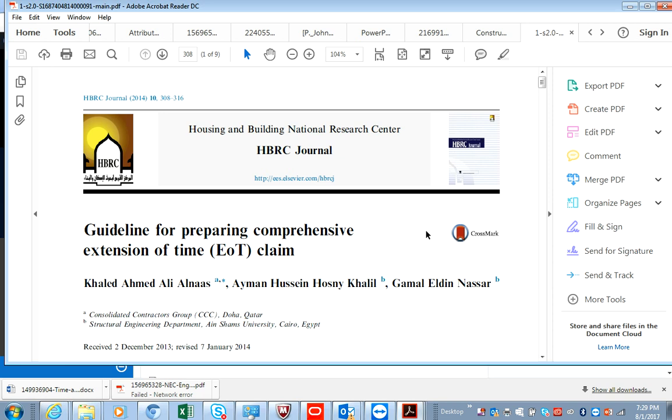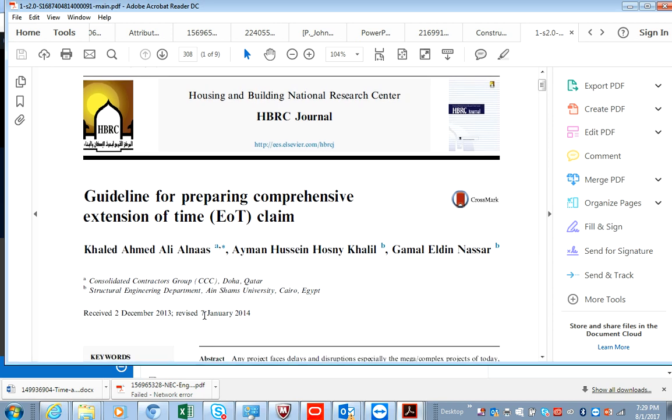So say for instance the early warning notice happened this week. Next week's update would have to include the early warning notice within the program, or if we have been told to make provisions for it in the key milestone area of the program, then you put it there. So it's down to whatever it is that the contract data requests. Okay, so we move on swiftly.